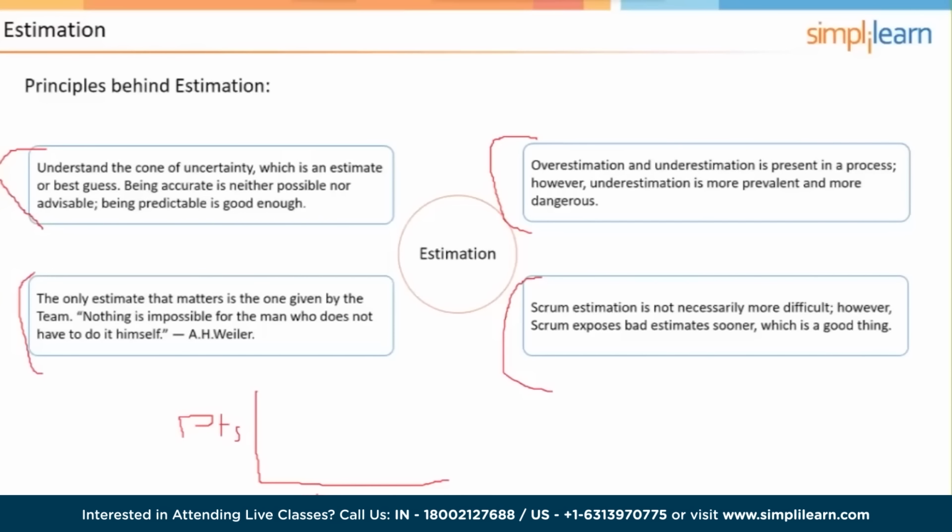You would expect that maybe the first couple of sprints, the team would be learning how to work together, and there would be a steep curve, and then it would kind of flatten out and maybe have a slow rise going forward as the team emerges as a high-performing team. They get better at their cross-functional behavior. Somebody's sick, the team just keeps chugging along. So the team learns how to work better together, and their estimates become more accurate, etc. And you would expect a high-performing team to have a result like this for velocity, where there's quick improvement, and then it kind of stabilizes and then begins to tick upwards.